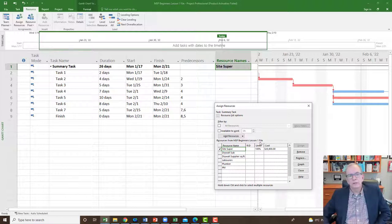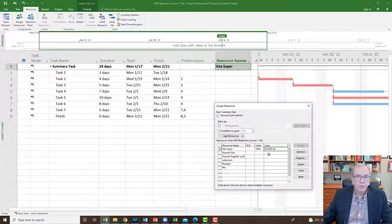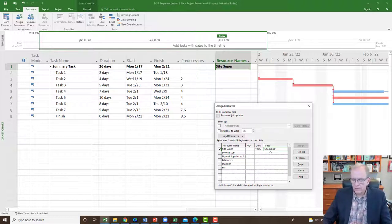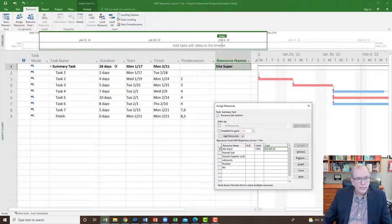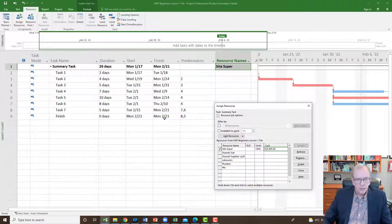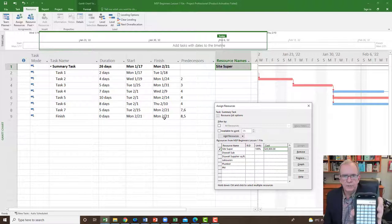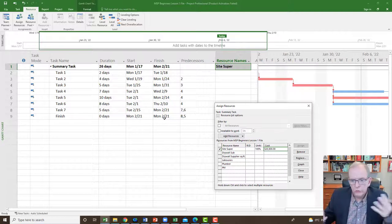I want to assign the site super at 100% to this project. I'll just click Assign and it puts 100% and shows $20,800. Where does that number come from? If you're doing cost loading you should know how the software calculates it. We said $100 an hour times 8 hours a day times 26 work days from project start to finish — that gives $20,800. Good to know where the numbers come from.